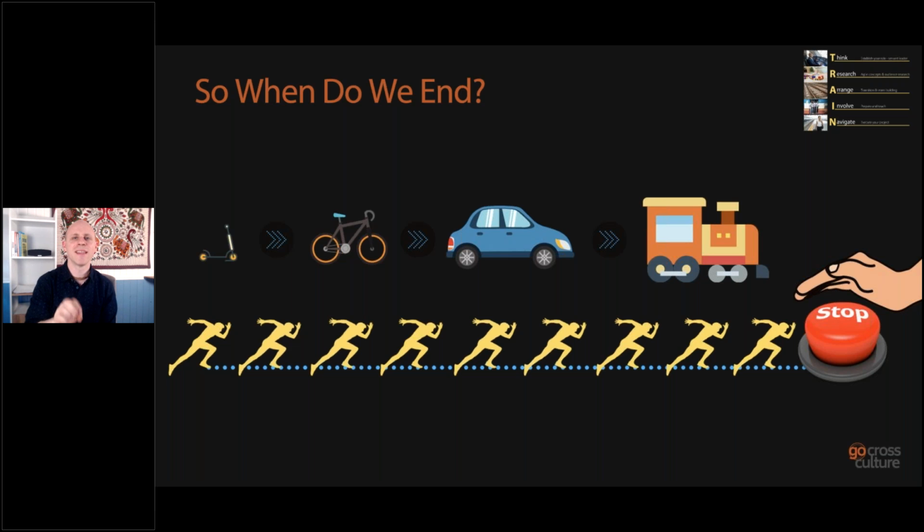So this is the difference with Agile, and particularly with Scrum. The project ends when the customer says it ends, and this is what organizations struggle with, because they want predictability. The key difference between waterfall and Agile is, and why you need to make Agile happen if you can, is at the end of every sprint, the customer gets to see the software increment.